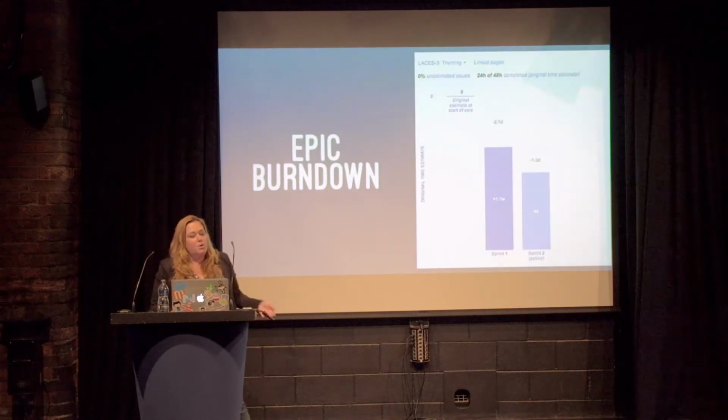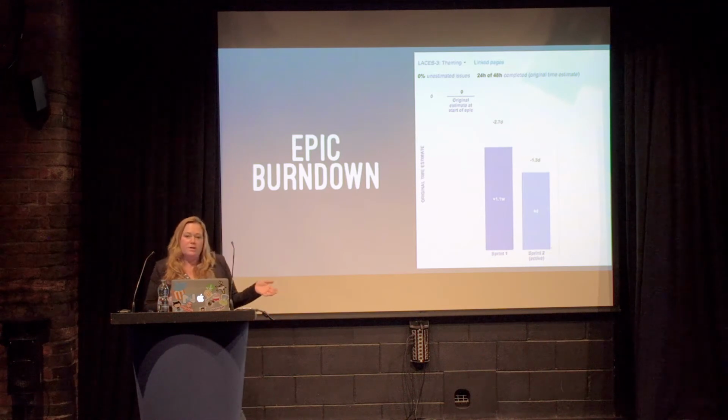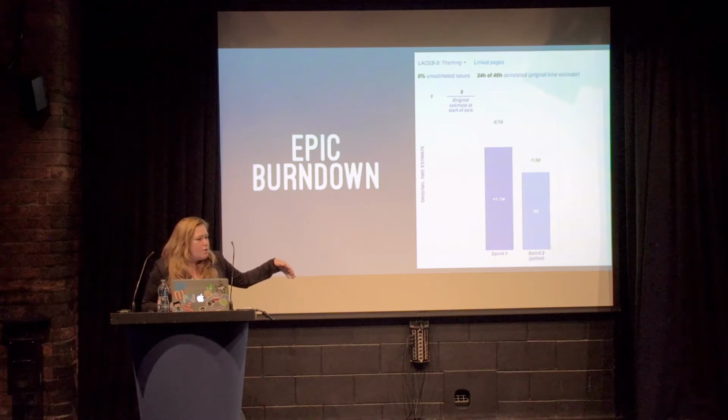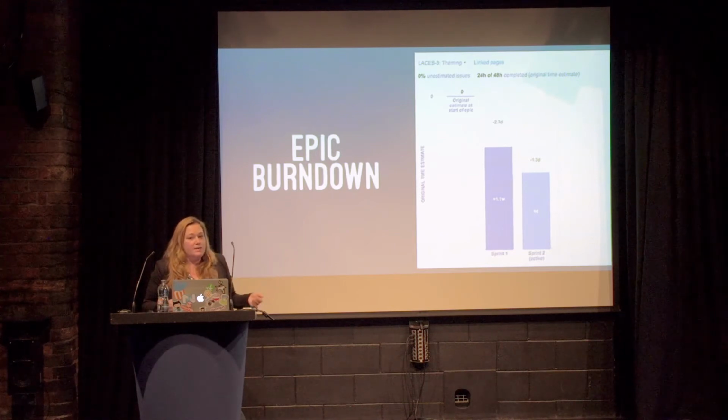Then you can also get a Burndown Report. So similar to the first Burndown Report I showed, this one is just for theming. So I can see that right now, for my theming, I still have 4 days to go. Maybe if I want to finish that in 2 days, I need to add another developer for my front-end developers. My back end, I might be at 2 days. So this way, I can do my resource planning a little bit better by using epics this way.